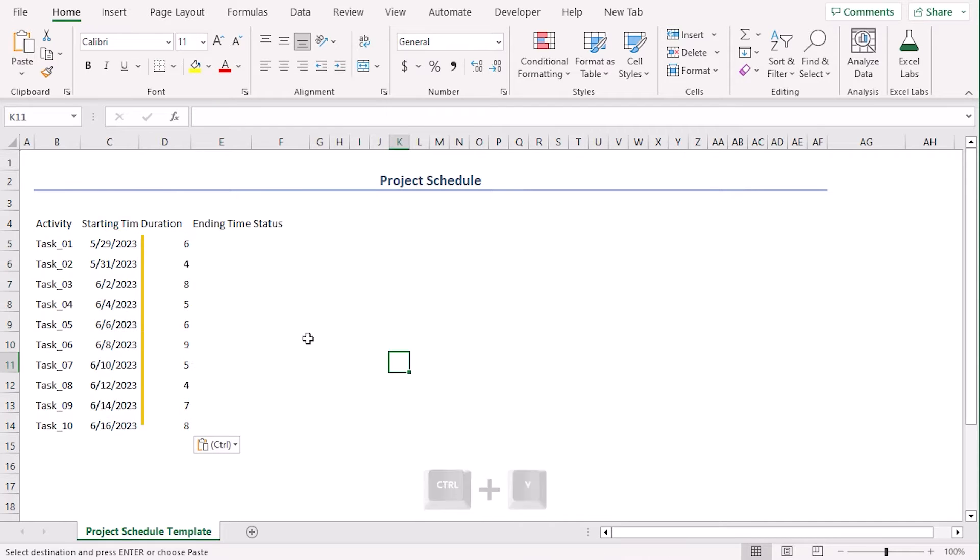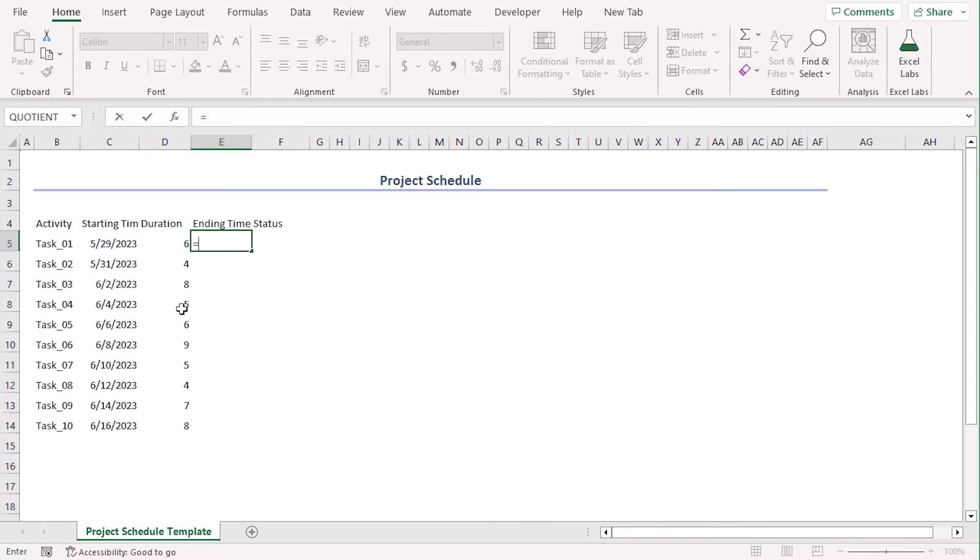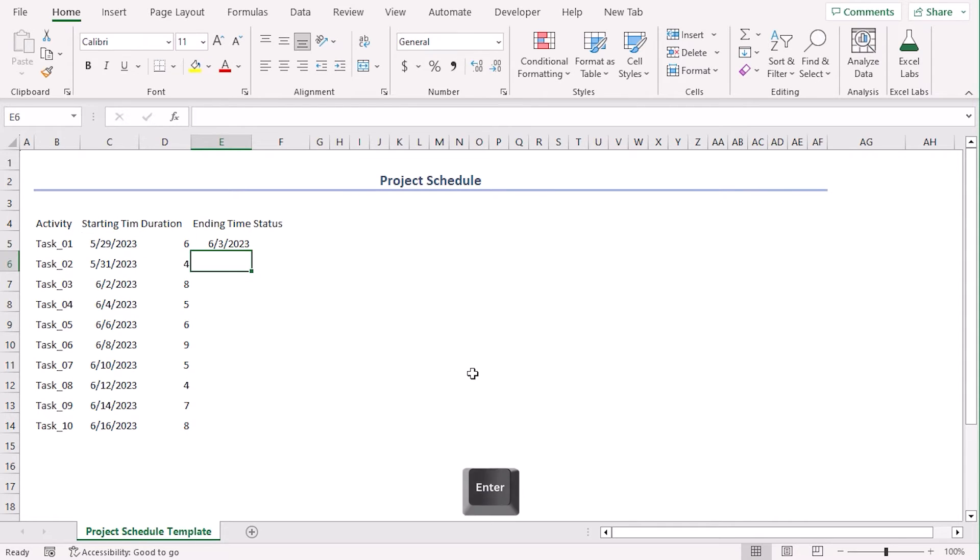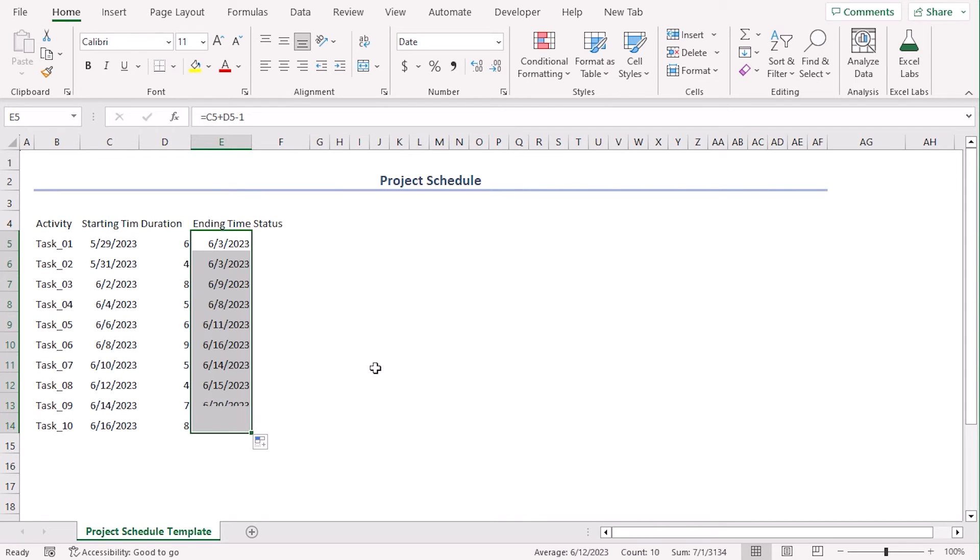Now we can see our starting time and duration. Let's calculate our ending time equals C5 plus D5 minus 1. Since our starting time will also be added in duration, enter. Let's use fill handle to drag till 14th column.